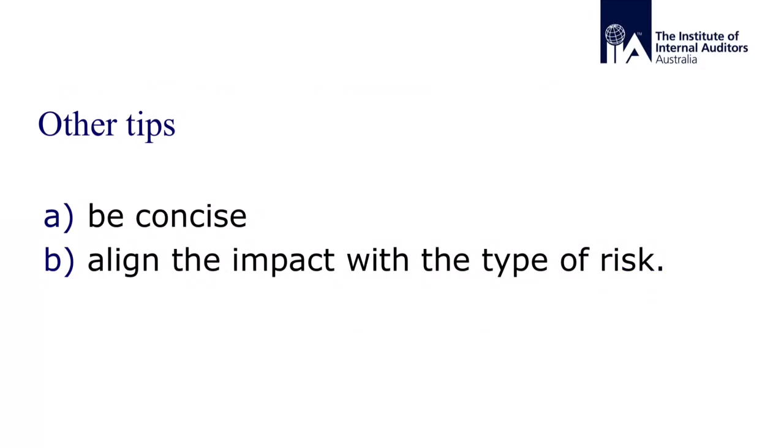A couple of other pointers for writing risk statements. First, be concise. Keeping risk statements to less than 20 words improves readability and understanding. And that's why many organisations extract the impact and include it as a separate section in their risk registers.